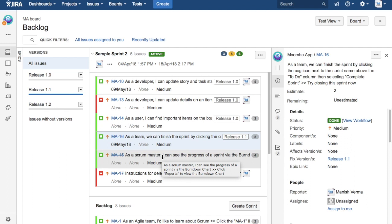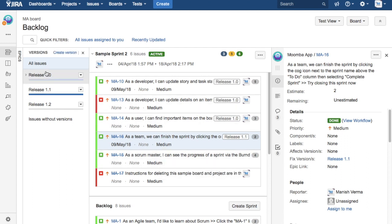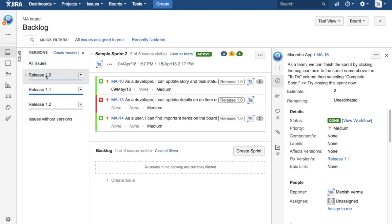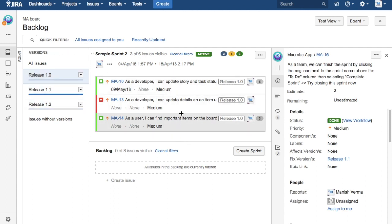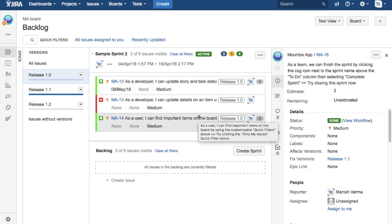Once all the issues that have been prioritized and assigned to the releases, a release manager will just come back to Jira and see the progress of the release overall. Once all the issues have been done, then he is ready to do the deployment for that particular release in production.